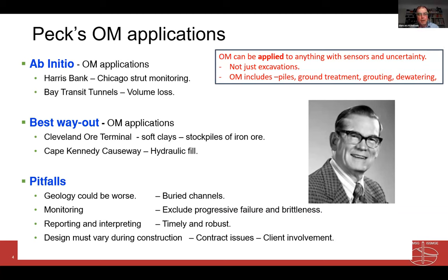And that varying of construction leads to contractual issues and client involvement, and Tony will talk about some of the difficulties with that. And OM, in principle, can be used in anything with sensors and uncertainty, not just in excavations. It can be done in piles, ground treatment, grouting, and dewatering.